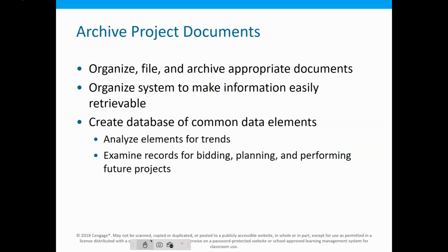We also can then take that data, and the term you a lot of times see is big data. In other words, we've got all these pieces of data, and we need to be able to mine it, to see if there are trends or things happening inside our project that we didn't know about. So what we may find is that overall, our project maybe broke even or made money, but we lost money on certain components of it because we underbid some pieces.